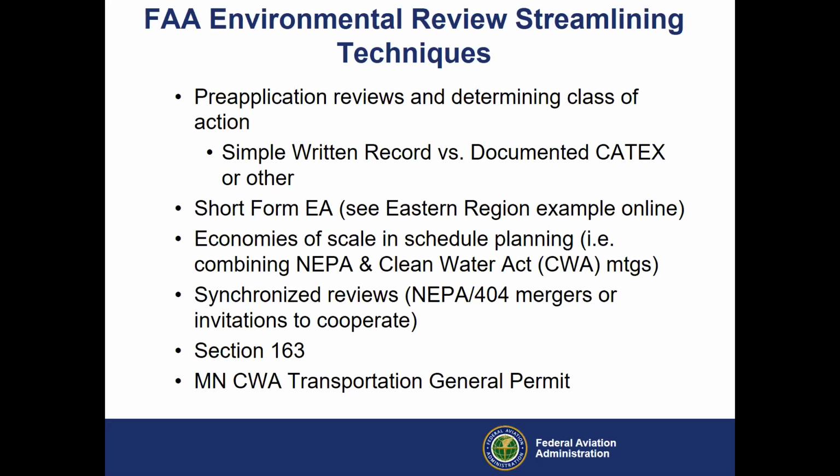What qualifies for a short form EA? I would say projects that are pretty benign on the landscape. Maybe it's a big hangar area or something. We recently did a solar facility up in Brainerd using that short form moniker. So, things to consider there. If it's a new runway extension or whatnot, I would say a short form EA is not appropriate. Maybe you got new procedures out there, but something to consider in keeping your hip pocket.